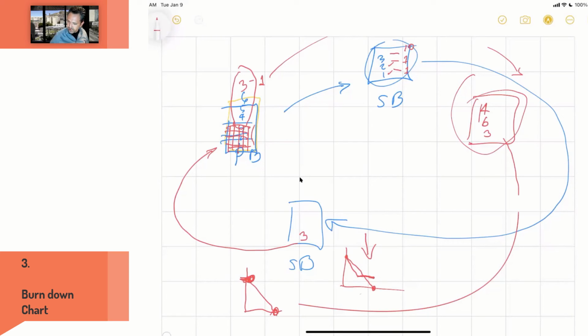The addition of the story points of the new items that I put in my new sprint. So the chart here is going to start in the same point. We're going to start working and moving down, and hopefully we finish. So second sprint starting 0. The first sprint starting 0. It doesn't matter whether the previous one finished or not, because you create the burndown chart for the sprints. The sprint start, the sprint end.